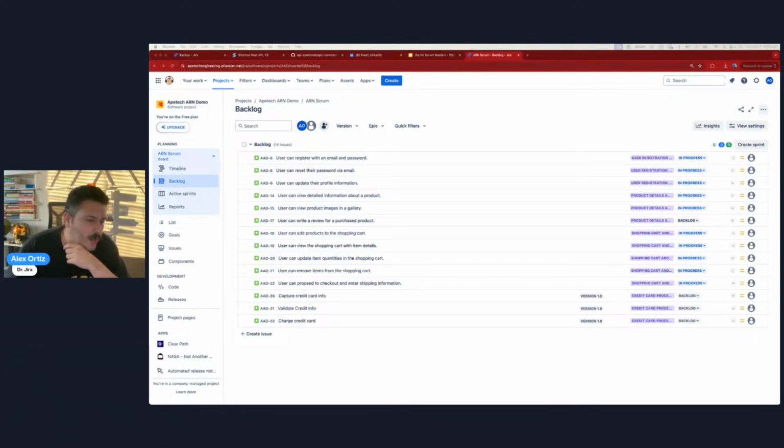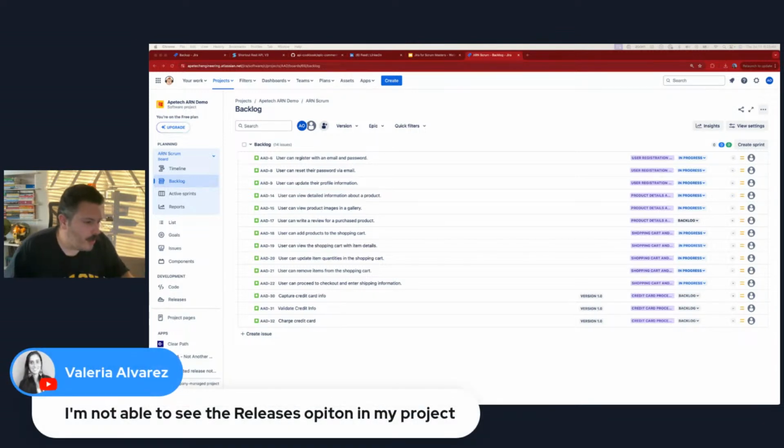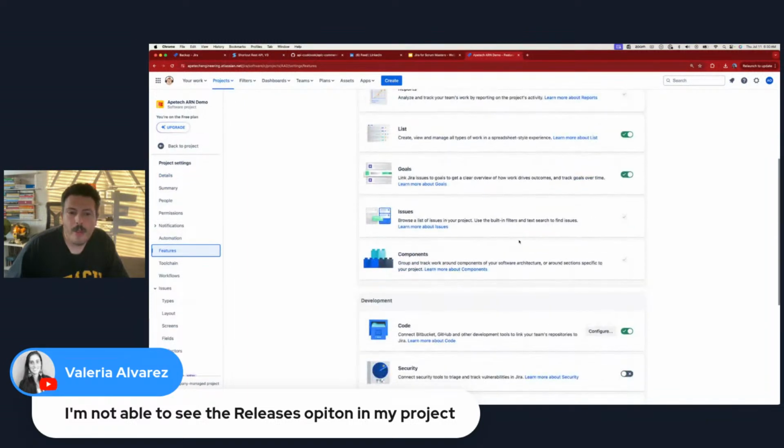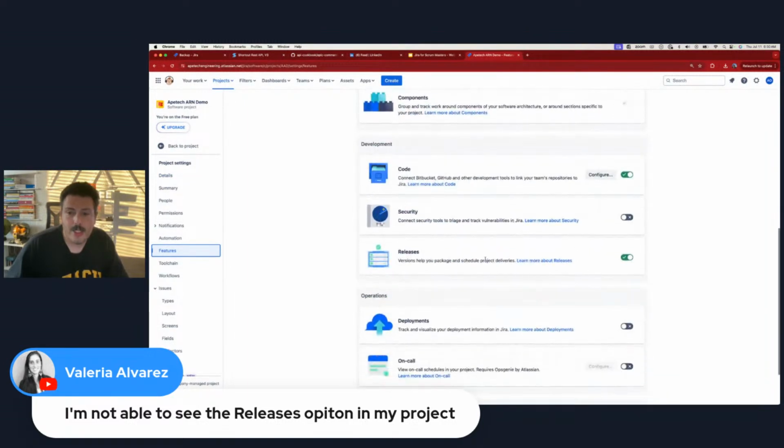Let's see what we got here. We got a couple of questions, so let's go back and answer some. So Valeria Alvarez says, I'm not able to see releases option in my project. So that's also a feature. So if you can't see releases, you can go to project settings, and there's a feature section here. And so you want to make sure you turn on releases. So you want to make sure this slider is turned on.